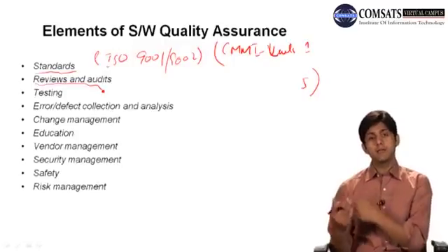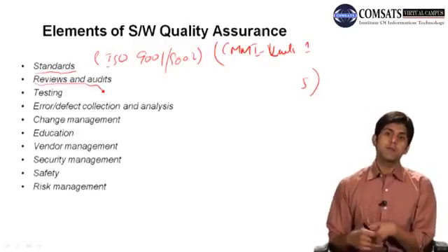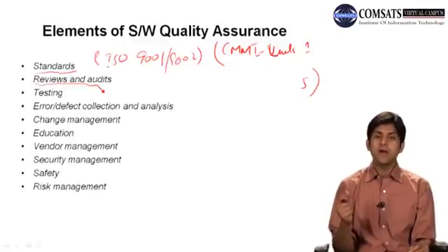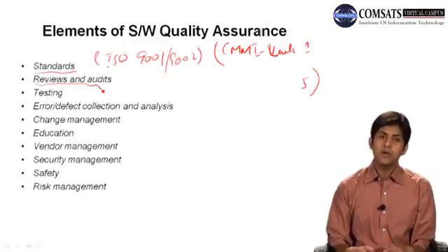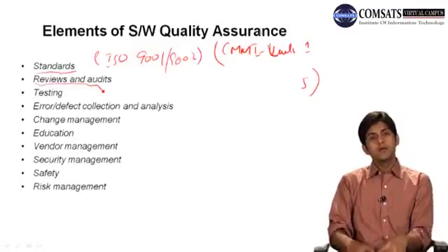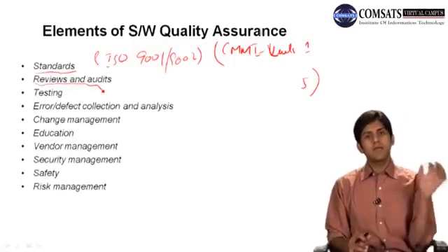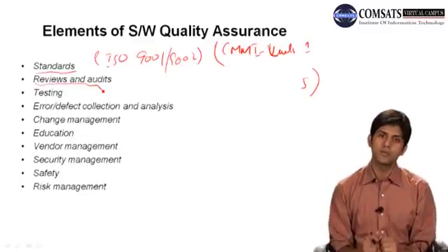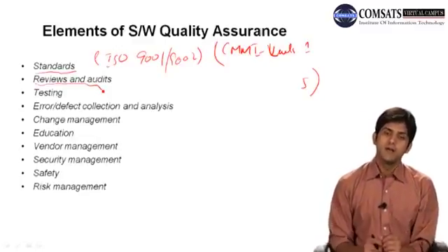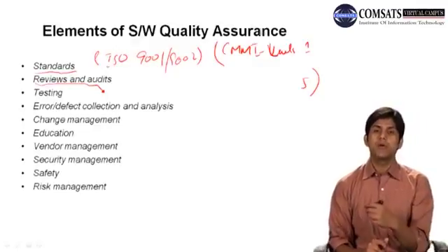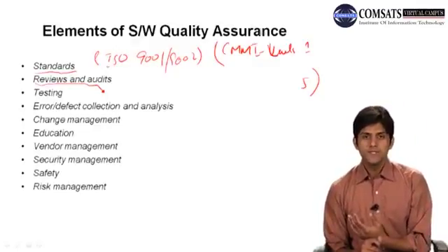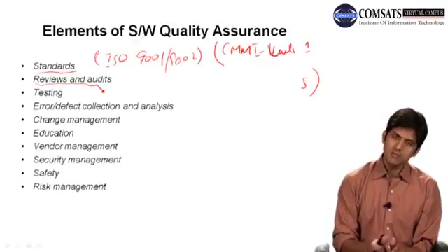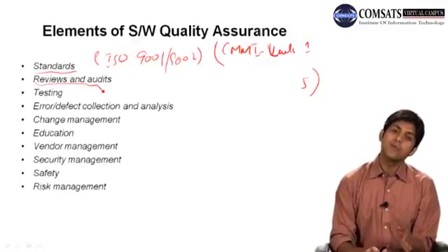ठीक है. And then there can be more complex reviews जिसमें आपने for example पूरे के पूरे SRS document लिखा हुआ है. So you have technical people and you have maybe quality, you know. So आपकी quality team के अंदर you can make a group, you can make a team जिसके अंदर you can have a business analyst, you can have a quality person, and they sit together and they try to review that document. ठीक है. So the reviews can be like that. Reviews normally दो तरह के होते हैं. We can perform formal reviews. जब हम इसकी प्लानिंग कर रहे होते हैं तो we actually plan, जो भी प्लान रिव्यूज होते हैं जिनका टाइम भी पता होता है और टीम भी बनी होती है, these are called formal reviews.